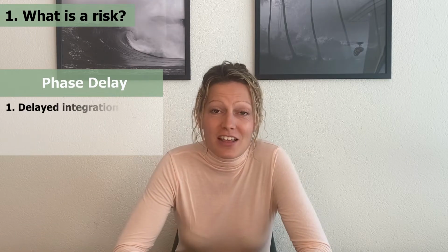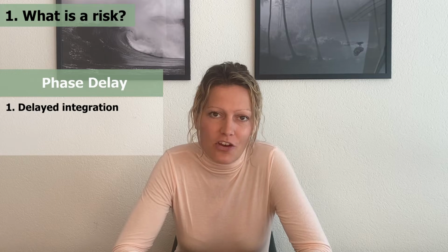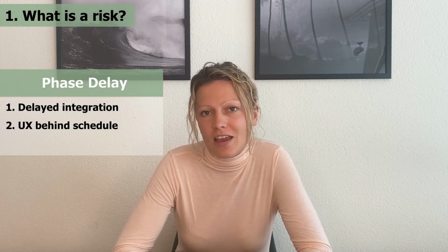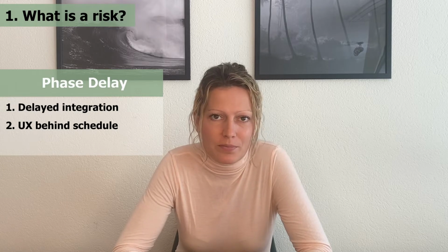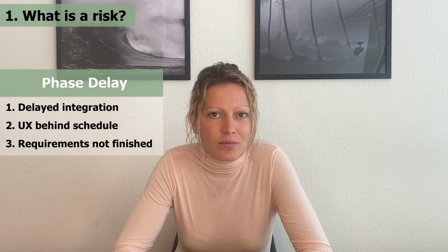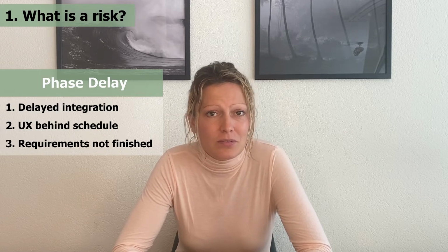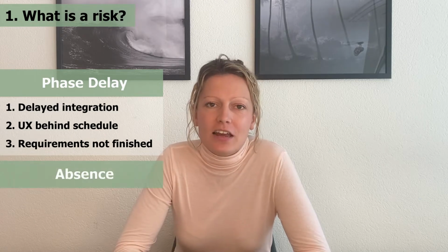For example, if an integration isn't delivered on time, then business users can't test the end-to-end user journey. Or if the UX is behind schedule, then requirements handed over to tech teams aren't depicted properly on wireframes. Or if you just ran out of time to write the requirements you needed to, then the technical teams can't set about building them. The second group is absence of key personnel.